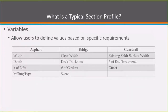A unique functionality of typical section profiles is what are called variables. Variables allow the user to define the values based on the specific requirements for the project. This helps keep the typical section profiles dynamic so that they can be used on a wide variety of projects. For an asphalt profile, the user can modify the roadway width, the depth, the number of lifts, and even the milling type.